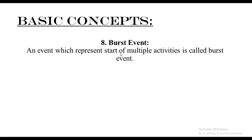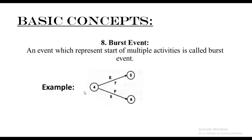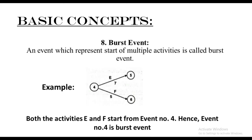Next we have the burst event. An event which represents the start of multiple activities is called the burst event — the exact opposite of the merger event. From a single event, when two or more activities burst out, that is the burst event. For example, both activities E and F start from event number four, hence event number four is called the burst event.